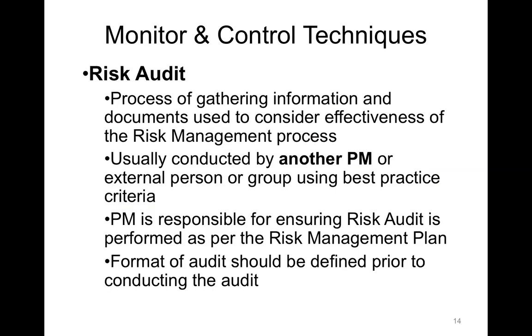Now, the risk audit comes usually close to the end of closing of the project or even closing the project, although none of the processes in project risk management fall under the process group of closing. It's really tied with that. Usually a risk audit, and risk is becoming more common in external audits in the world, but we're talking here about an internal audit, something done usually by another project manager. You as a project manager may be tasked with this one day. If you're experiencing some idle time and you're working between projects, you might be tasked with auditing the project risk management of another project or another project manager.